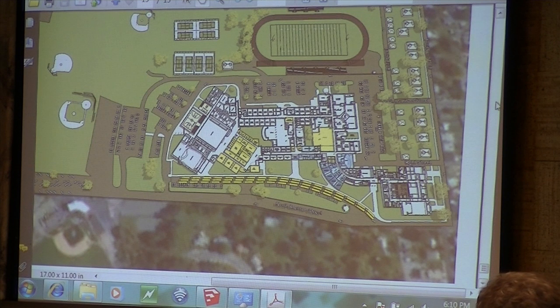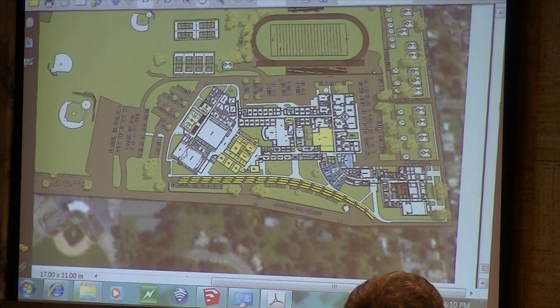The whole purpose here is between now and November 12th to have a scope and to have a cost. Then we can get together with all the committees in detail and begin really designing this stuff. What are the geometries? How does this work? What did we overlook? And it's been a real whirlwind to do this in the 3 weeks we've had.